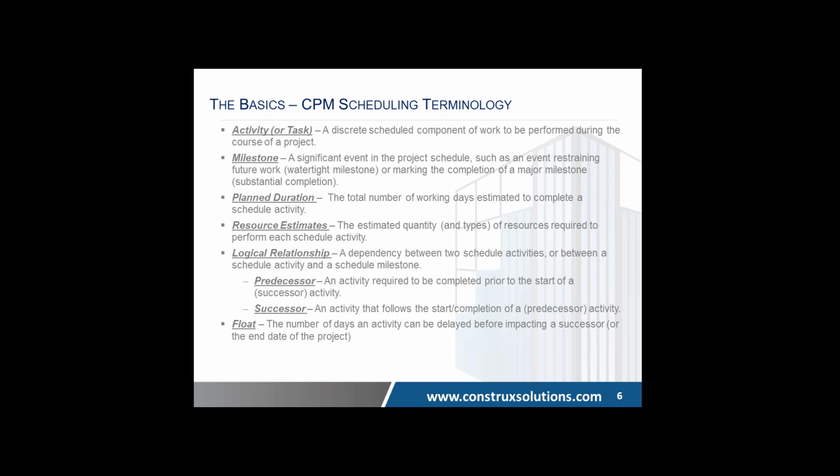Say we're putting a foundation in and we need it to get done in 10 days. We will decide how many people are necessary to do that, or vice versa. If we know that we can get up to 20 people on the site maximum, then you can estimate your duration based on that. So these are the things that you need to think about when producing a schedule. You create an activity, you give it a duration, and then you can give it a resource estimate to reach that duration.